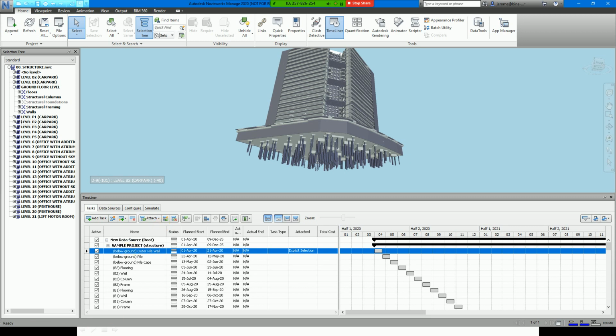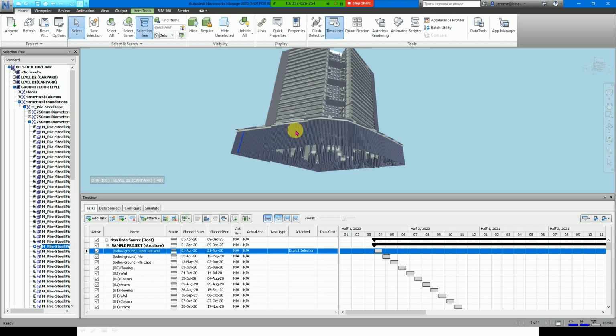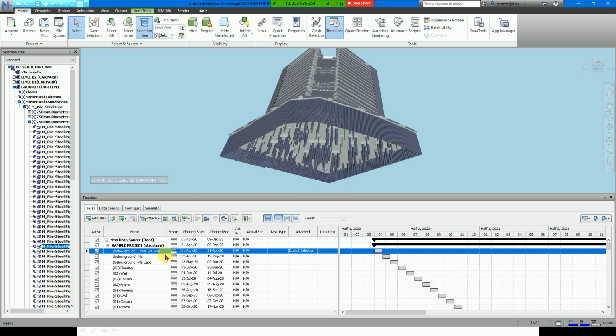So each time you click one, you only select one section, like this one, right? Yes. If the schedule here was divided into 4, like 1, 2, 3, 4, what we do is select this one, hold the control key, then select the others and assign as indicated in the program.